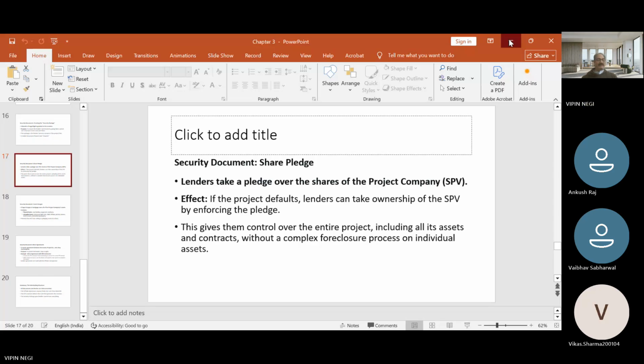Okay. Based on the implementation schedule, during the implementation phase, funds from these accounts are transferred to the construction account, which is a sub account basically for meeting construction expenses, and to the interest service account for meeting the interest payment during construction.